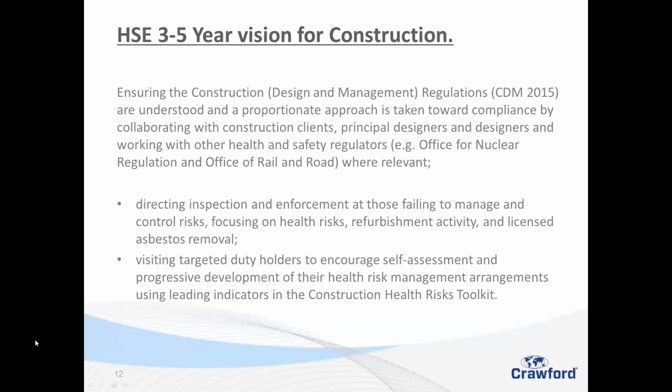I say this quite a lot. I'm a great believer, and don't forget, this is my opinion, but it's a very secure opinion, which is, if you think there's an ACM on a property, get it tested. You can't look at it and say whether it's asbestos or not. It's got to go to a laboratory and be checked, because if you go into a premises with asbestos and you haven't taken precautions, then you will have a problem with legislation, but don't forget, we've also got a moral duty. We've got to look after our employees.